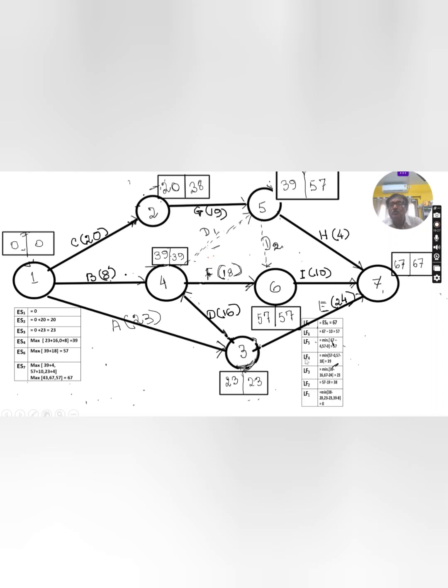You can check it for LF4, this is LF4, minimum of 57 minus 0 and 57 minus 18. Which of the two is lowest? Lowest one is 39, that's why the latest finish time is 39, it is correct, no problem.